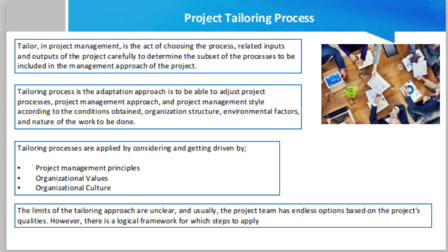Now we can talk about summary level tailoring. In summary level tailoring, depending on the project characteristics, the project manager applies overall guidelines for tailoring the standard process. That is, it provides some general rules regarding certain types of detailed activities. To perform this step, the project manager first identifies certain characteristics of the project. For development projects, the characteristics used are experience and skill level of the team and the project manager, clarity of the requirements, project duration, and application criticality.